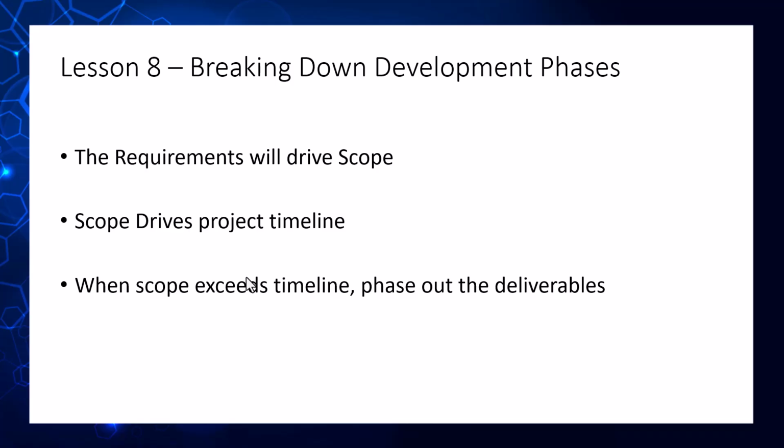But if that's not an option, you can say, all right, how do we reduce our scope so that we meet our budget requirements? And that might be there are 10 features that I would like the application to have, but they're not absolutely required. So why don't we mark those as nice to have? Let's put the nice to haves in a separate bucket that's going to be developed after our initial round. And maybe now with those 10 items out of scope, we can meet our 6-month deadline.